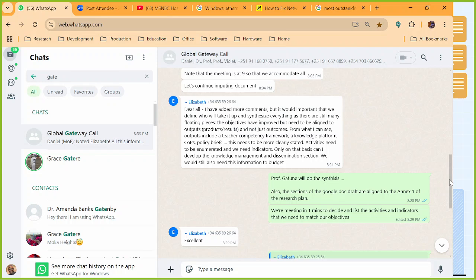No, Martin. I think because we already have the activities, you can pick from there, and we have the outline of the budget. Yeah, we do, but the problem with generic work is that when you get into the details, you're going to find that it's nuanced in a certain direction, and that nuance may not be accounted for in the budget. Unless we're having flexibility in how we deal with that. If we're open and flexible, then it's okay, we can work with the general one. If people are going to stick to this as a kind of Bible, then we get locked in early. That's what it means to go to this level of detail.